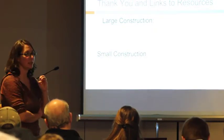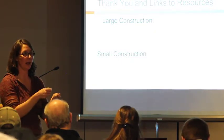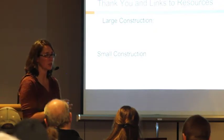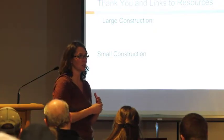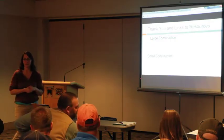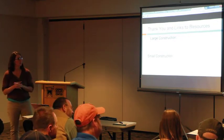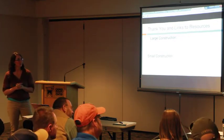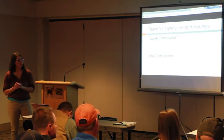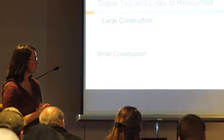But honestly, take your SWIP out there with you, and you could write things into it as things change. When you're doing your inspection, that's a great time to change your SWIP, because you see it right there and you just do it. That would keep your SWIP and your sitemap updated. If it's changing constantly and you're crossing this out and updating it, when you get a chance to get back to your office, then you can print out a new one and get it updated. But we will look at it when we inspect.